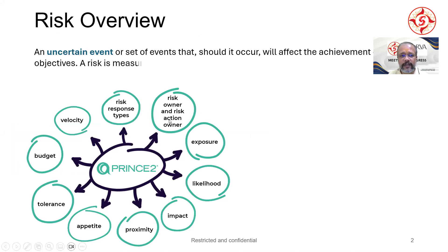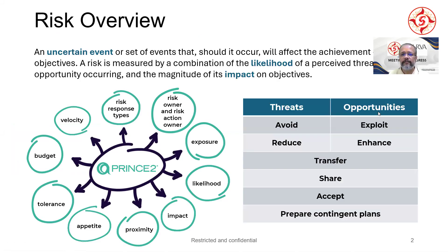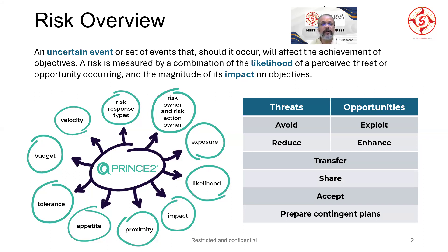Let's start with a risk overview. The definition of risk says: an uncertain event or set of events that, if it should occur, will affect the achievement of objectives. Every project has objectives, goals, outputs to be delivered, and outcomes to be achieved. There could be uncertain events that may or may not occur — that's the probability. If they occur, they affect your achievement of objectives in a positive or negative way. A risk is measured by the likelihood of a perceived threat or opportunity occurring and the magnitude of its impact on objectives.